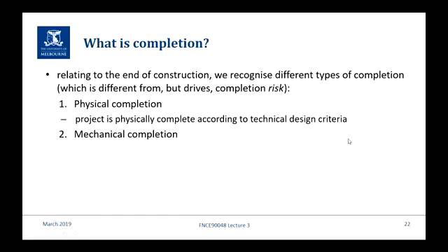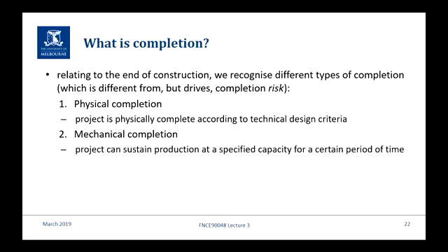But in terms of project finance, recall that the lenders want to be as sure as they can be that the project is going to be able to repay them. So just physical completion usually isn't enough. What they often require is what's known as mechanical completion. That shows you that the operations happen, so the project can actually produce the oil or the electricity or whatever it is that the project's been set up to do for a specified period of time.